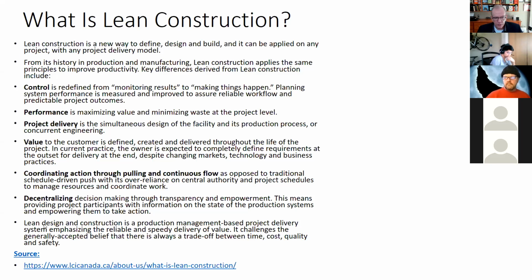If you're going to get the full benefit of Lean, it's not going to work fully on a lump sum project. When you have a lump sum project, you have limitations because you're coming in after the design, so you have no influence on the design. The design is done. Full Lean means you're coming in at the design stage so that you can influence the design, so that it is based on the value it provides to the client, but also looks for the most efficient, productive way of constructing it.